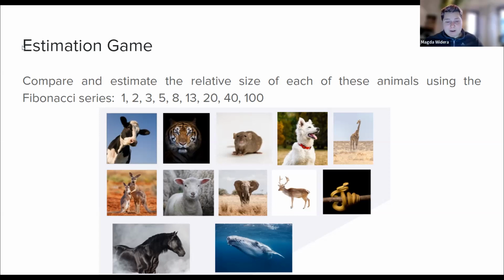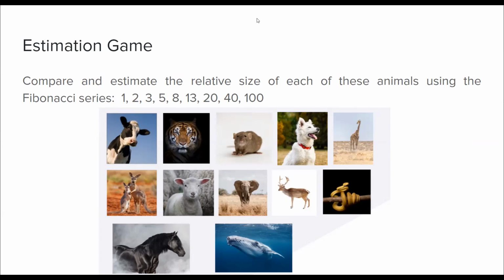Yeah, that's a very good point. And as well, the teams change. You will not always work with the same team. People come and go. People are not there because of holidays and sickness. And if you don't know what your baseline is, then it's going to be very difficult to estimate. Yep. It also allows you to evolve it over time, so it's not a once and done. As things change, as your process changes, some tickets that were previously an 8 will now be a 5 because you've implemented a different tool or changed your process. So again, that's why it's useful to have that baseline and continuously evaluate it.